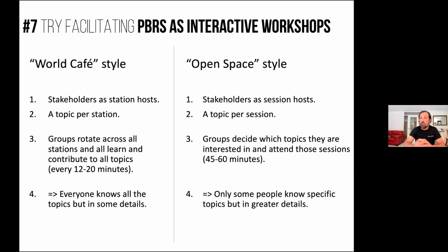So depending on what you want to achieve, like a broader understanding, you go World Cafe. More deep understanding, you go open space. You can actually combine these techniques also. If you are just trying multi-team PBR, you haven't done that before, I would probably go World Cafe, because you